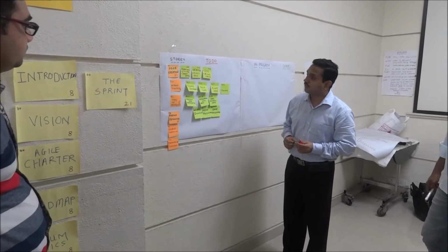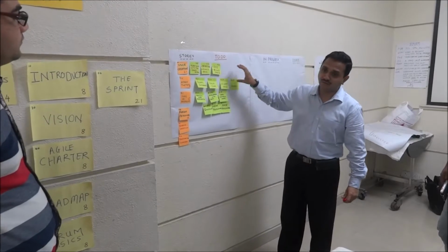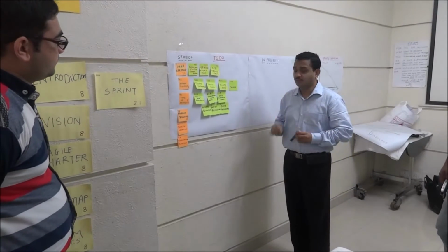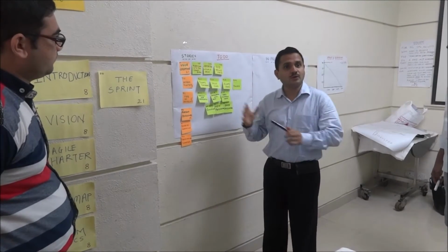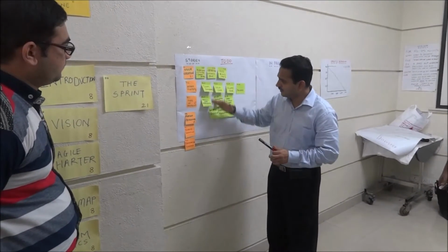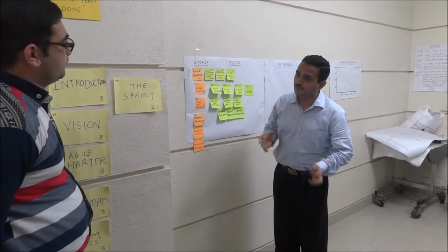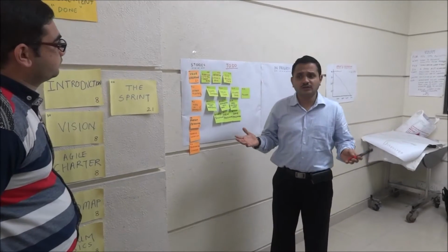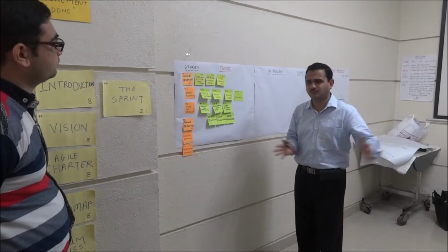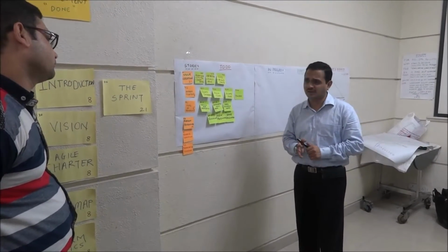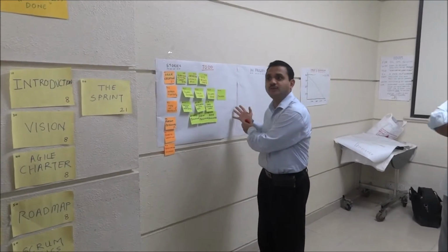Okay. So now what we have done is we have taken each story and essentially divided them into tasks. The first step is selection of stories for a particular backlog. Before you even do the tasking part, your job is to select your velocity. The velocity, as I told you, is going to be dependent on the last 2 sprints, or the last 4 sprints if you have done so. Take the average, and you will select stories for this particular sprint.